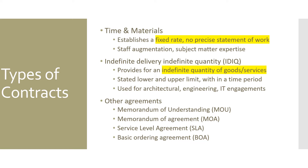The fourth type of contract is IDIQ — Indefinite Delivery, Indefinite Quantity — which provides an indefinite quantity of goods and services with stated lower and upper limits within a time period. It is generally used for architectural, engineering, and IT engagements. Other agreements include Memorandum of Understanding (MOU), Service Level Agreement (SLA) used in production and operations, and Basic Ordering Agreement (BOA), used for prototype scenarios to establish an initial understanding with a supplier before committing to a main contract.